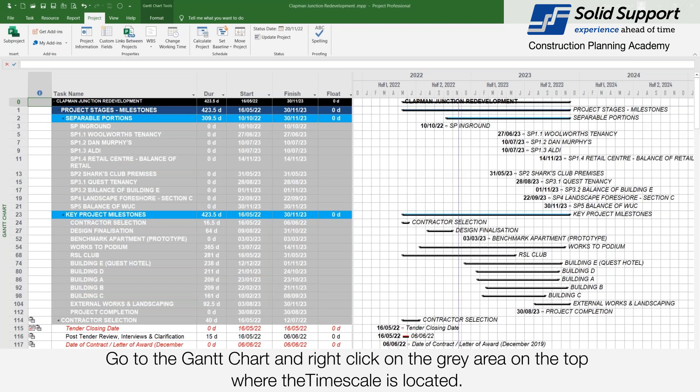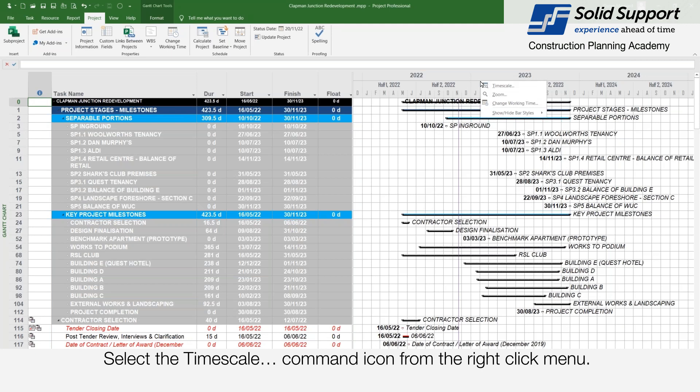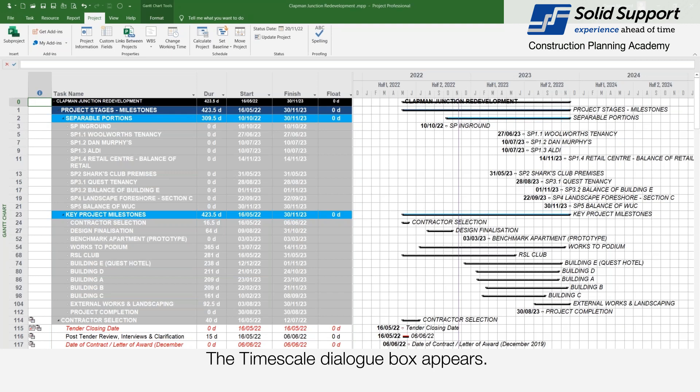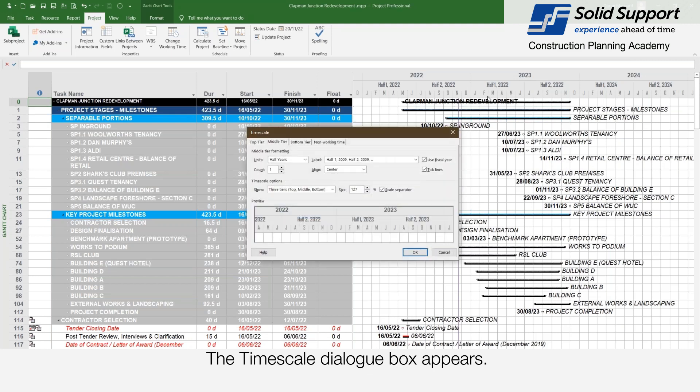Go to the Gantt chart and right click in the gray area to the top where the timescale is located. Select the timescale command icon from the right click menu. The timescale dialog box appears. Go to the timescale options section.